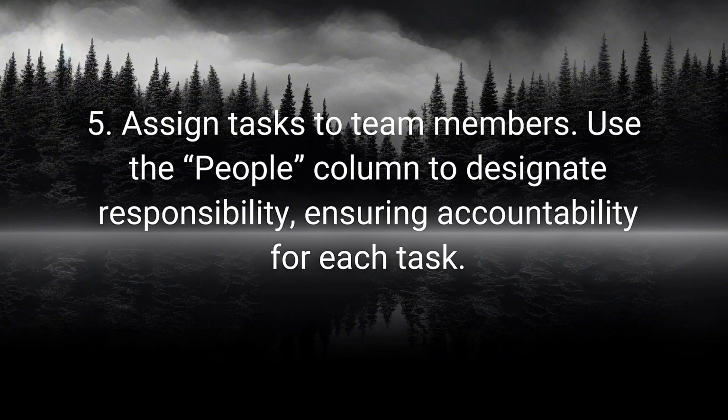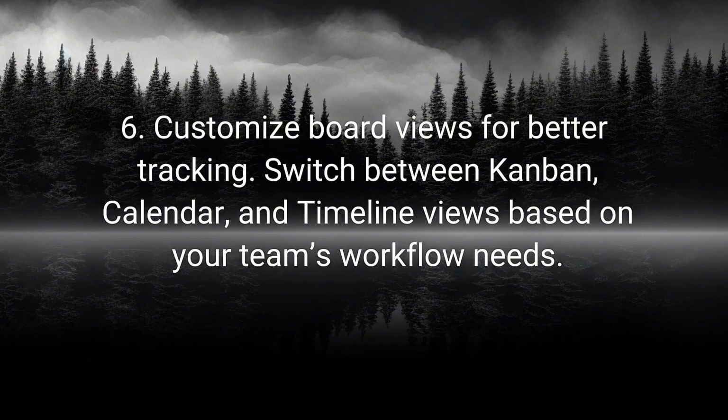5. Assign tasks to team members. Use the People column to designate responsibility, ensuring accountability for each task. 6. Customize board views for better tracking. Switch between Kanban, calendar, and timeline views based on your team's workflow needs.